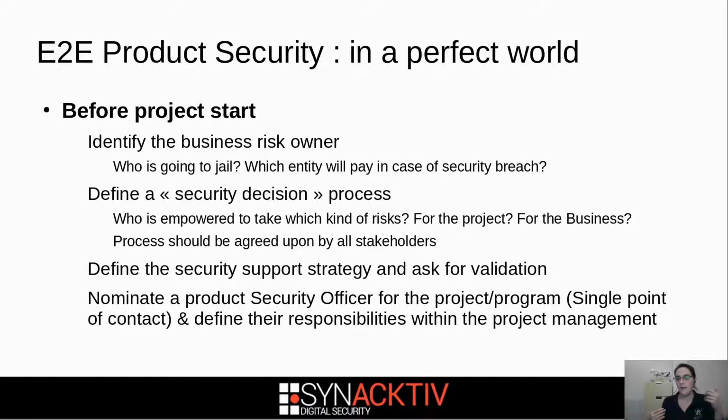So typically, what I call a security support strategy is, for example, in one of the projects I made, we decided that all security requirements would be accepted by default. So there would be no discussion by default on security requirements. But if we discover during the project that a security requirement poses a specific issue for a specific function or cost, quality, delay of the project, we would take a decision on this specific security function. So that's a kind of strategy you could do.